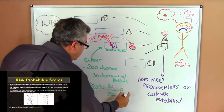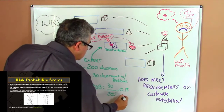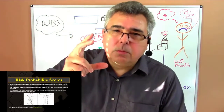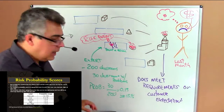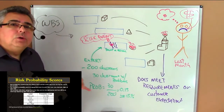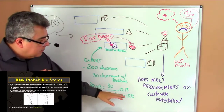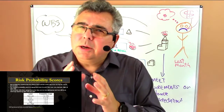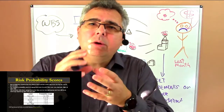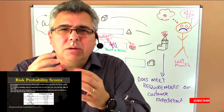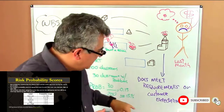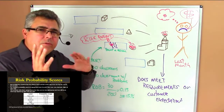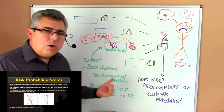That would be 0.15 — something around 15%. So you can use that interview to understand the probability. Based on that, you can make some decisions. What we try to do here is give a numerical scale for the probability. In some places we work with probability in percent, but mostly it's better if you can classify that according to the project.